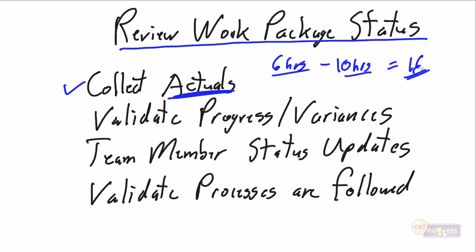Next week comes along and I say, how much time have you spent on it? Well, I've spent another 4 hours for a total of 10 to date. And again, we hold our breath. How much time do you have left to be done? They're going to look at you with a big grin on their face and say, I'm going to be done in 2 hours. Awesome. So now we have a total estimate of only 12 hours. That's the kind of news project managers like to hear. The task is going to be done ahead of schedule or under plan.